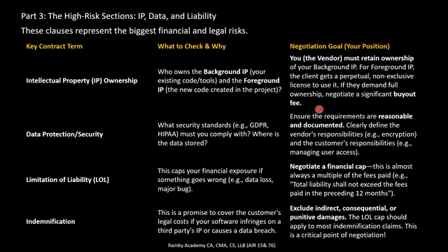So if you need to offer anything, or if the customer specifically asks, I need this ownership, then you need to define that on the request of the customer. You can sell that. Otherwise, the customer does not have any kind of ownership in order to use the IP of the supplier. This is very, very important to include in the contracts when you are using the IPs.